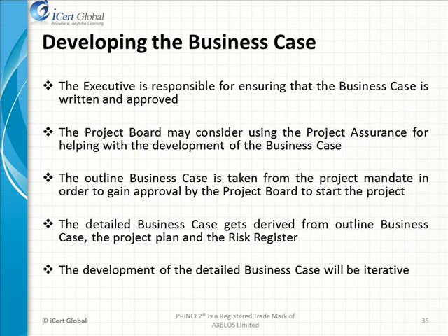Developing the business case. This is the same as create the business case. The business case is created and first completed in the initiation stage, and it becomes part of the project initiation documentation. The executive is responsible for creating the business case, but it can be written by others or with help from others.